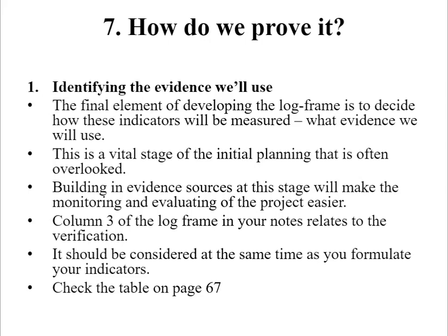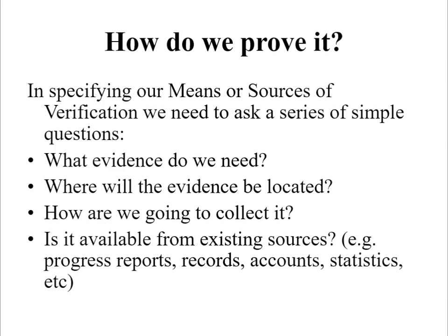Check the table on page 67, Module 2. In specifying our means or sources of verification, we need to ask a series of simple questions, such as: what evidence do we need? Where will the evidence be located? How are we going to collect it? Is it available from existing sources, for example, progress reports, records, accounts, statistics, and many more sources?